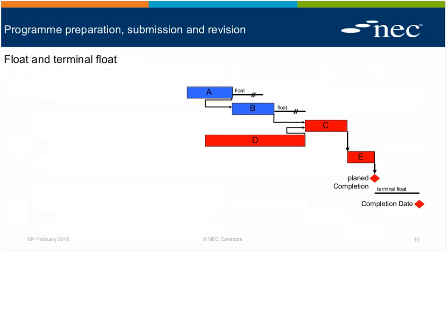So neither of these are defined terms, but you can deduce them from clause 63.3. So we know that the movement of a planned completion due to a compensation event is the awarded extension of time, if you like, that gets applied to the completion date. So completion date moves out by the same amount of time that planned completion moves out due to a compensation event when compared with the accepted program. So it's easier to say terminal float, isn't it, Rob? It is. By the way, planned is double N, isn't it? Not planed completion. Planed is another term, isn't it? Different again, planned completion, yeah.